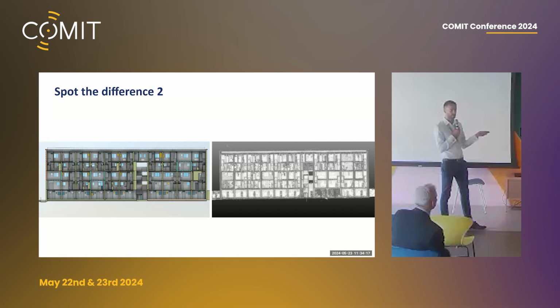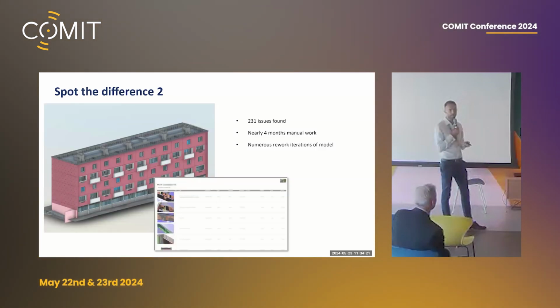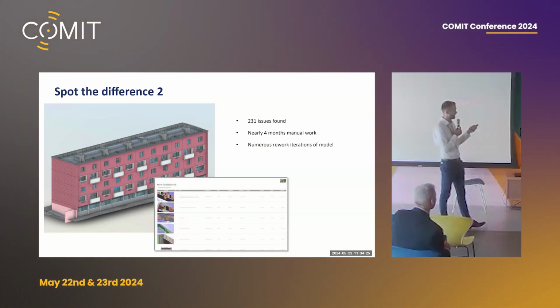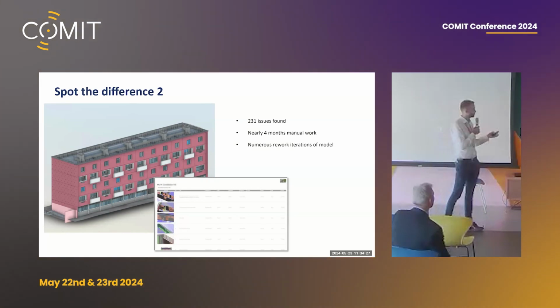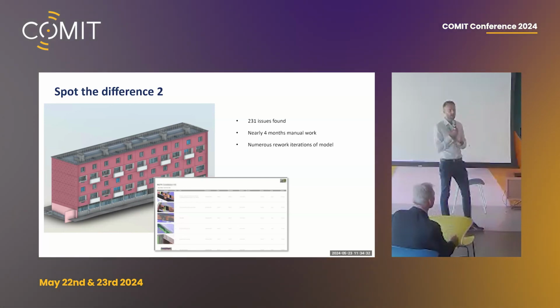Well, we actually know the answer because this was a real project. And it took the team about 4 months to go through and capture all of the discrepancies between the as-built and the design. In this case, there were over 230 issues, and it required numerous reworks of that model to get an accurate as-built model.